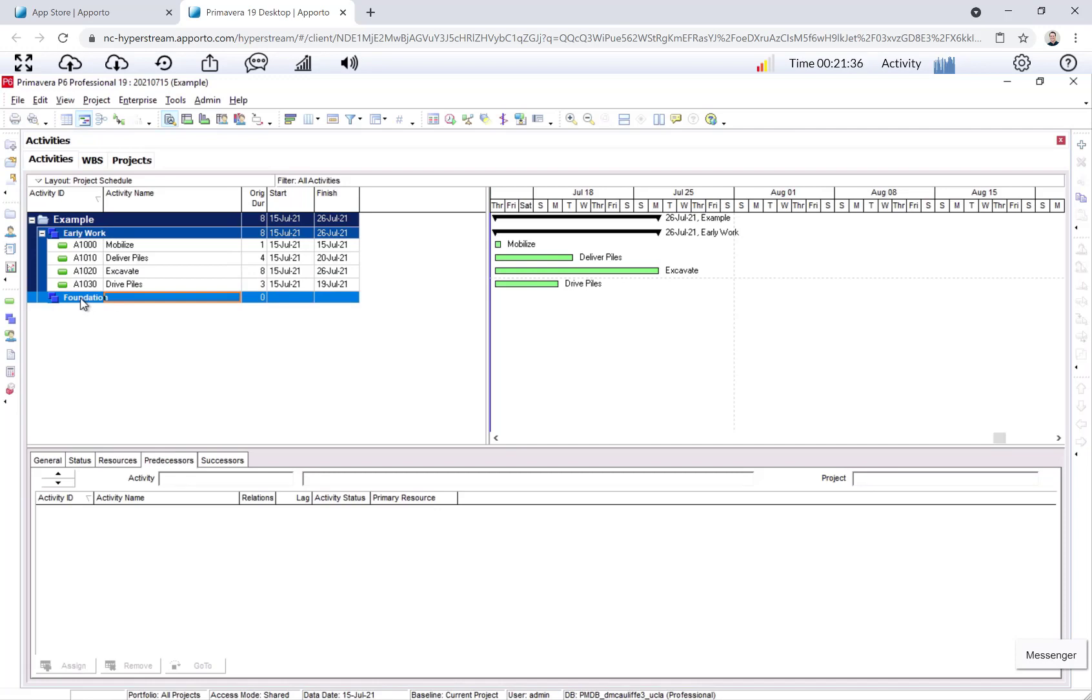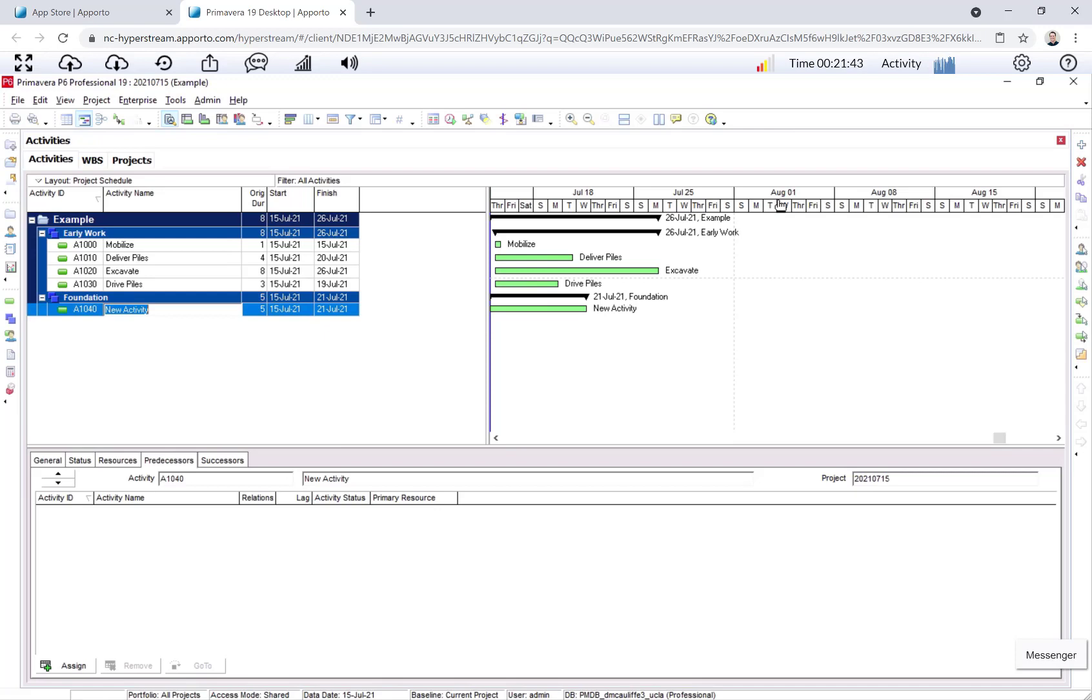Okay, let's keep adding all these activities. We're done with the early work WBS. Let's now go to Foundation. I'll click this plus sign to create another activity. And we will create prefab forms, tabbed over to the original duration. And I said six days.